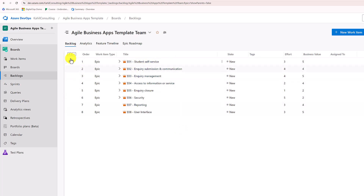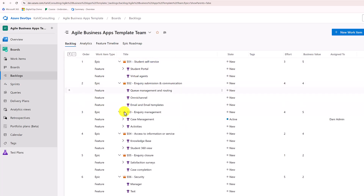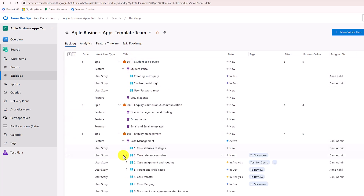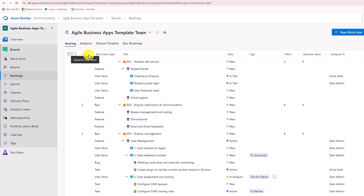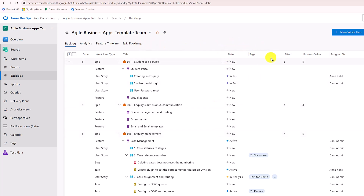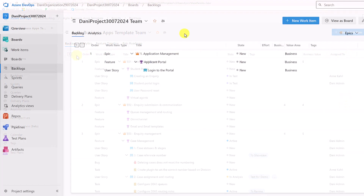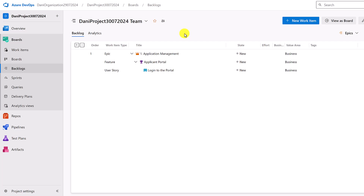Let me show you a more advanced product backlog where I've created multiple epics, each with multiple features, and under those multiple user stories. You can even go one level down — for some items we have tasks and bugs configured. For each item on the product backlog you can configure additional columns. The ones I usually use are: state, tags associated with each item, effort, business value, and who is the owner of that user story, feature, or epic.